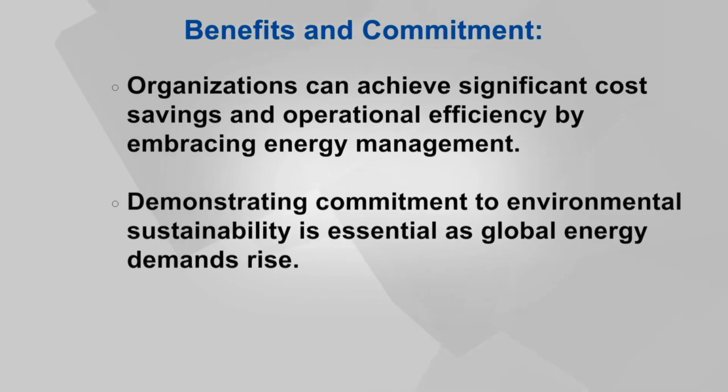High cost and high return measures require substantial investment but have the potential for large saving, such as installing new energy efficient technologies or major process changes. Prioritizing these measures often involves considering the ease of implementation, potential impact on energy savings, and alignment with the organizational goals. Low-cost measures typically receive priority due to their quick payback and ease of implementation, while high-cost measures may require more careful planning and phased implementation.